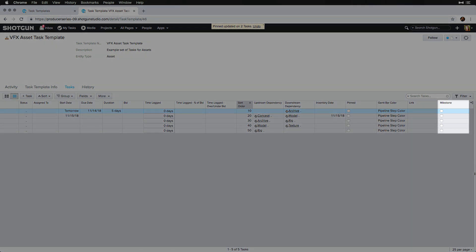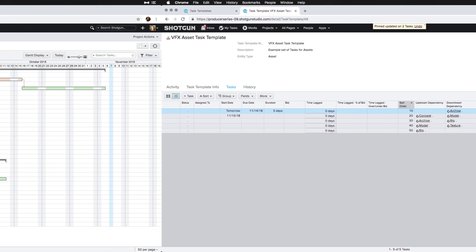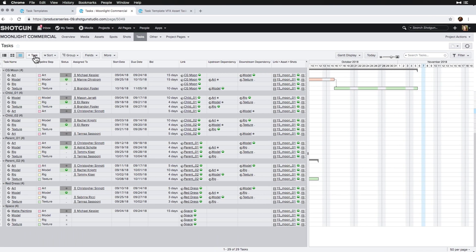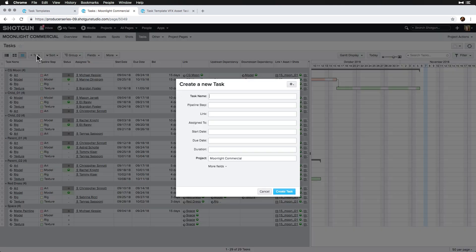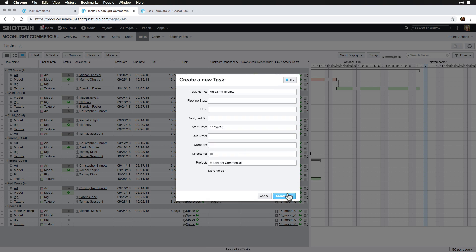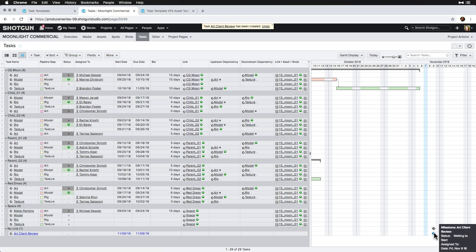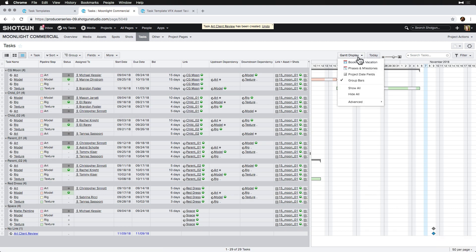We can add a milestone like an art delivery or client review to our schedule without making it a task. Once we check the milestone box, it'll be apparent on the schedule and will just require start date. These schedule milestones are independent from the project timeline created milestones that can be overlaid on the Gantt.